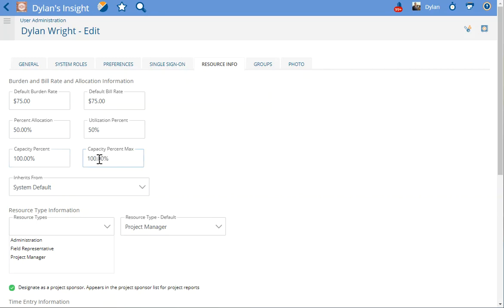Project Insight does this so that you, as the project manager or admin in PI, can let the project managers know that maybe you want this user to be considered over-allocated, but have a little bit of wiggle room of 5% before they're actually maxed out on the report. Now we see most users end up matching those if they do want that allocation alert to go out.